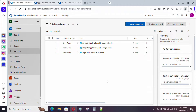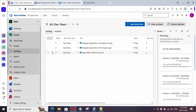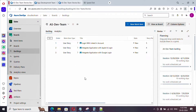Tips and important points will be shared at the end of the video, so please watch till the end. Sprint planning usually occurs on the first day of the sprint. In the sprint planning meeting there are usually two parts. In the first half, the product backlog owner reviews the backlog — there will be many items and they will be ordered. For example, if you want to prioritize 'login with linked account,' it will be set as order one, order two, order three, and so on.